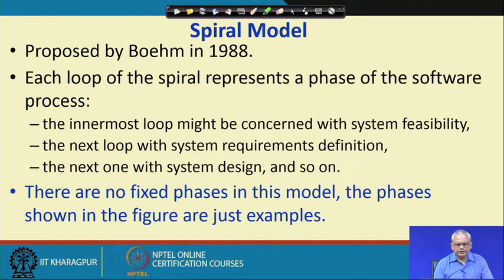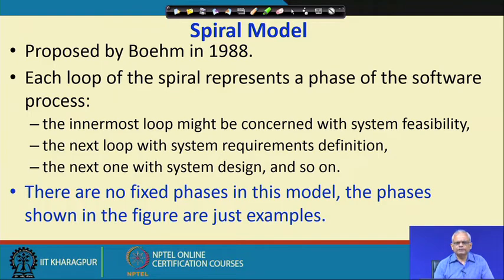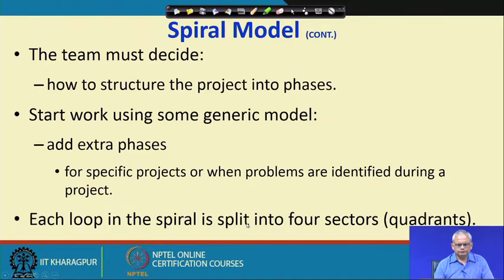One important thing about the Spiral Model is that each loop, called a phase, may not result in deliverable software, whereas in the incremental model every increment leads to a deployable increment at the customer site. There are no fixed phases in this model — the phases are determined by the project manager and team members as development proceeds. The number of phases are decided by the team, and in each phase some risk is identified and resolved using a prototype.